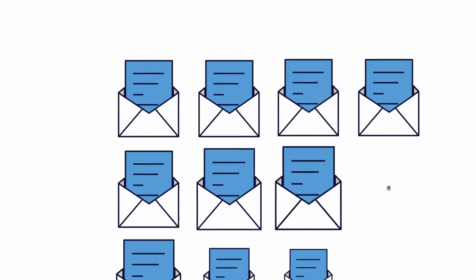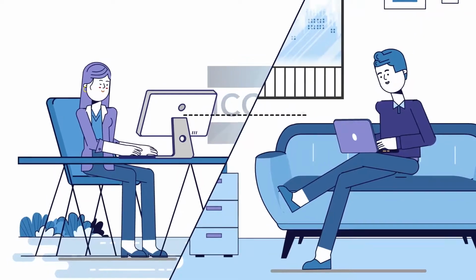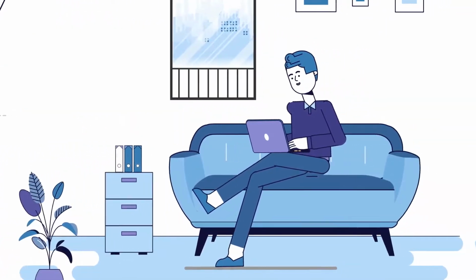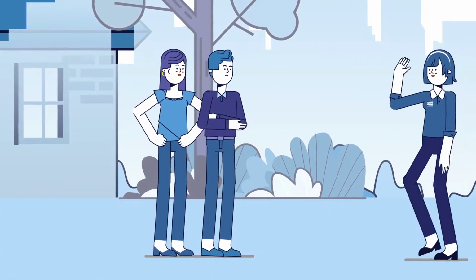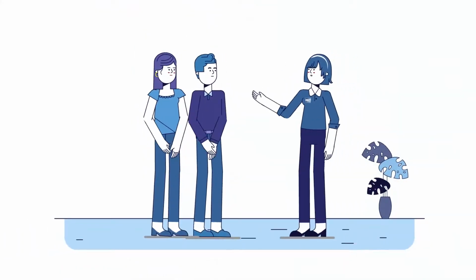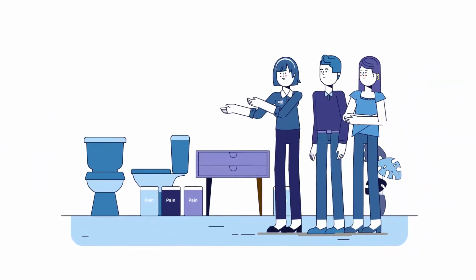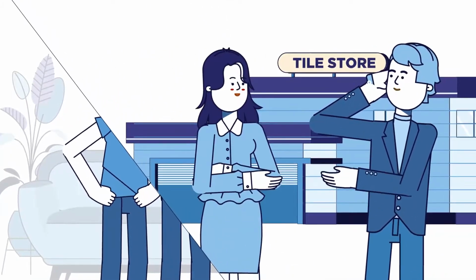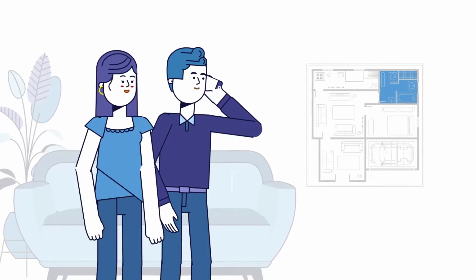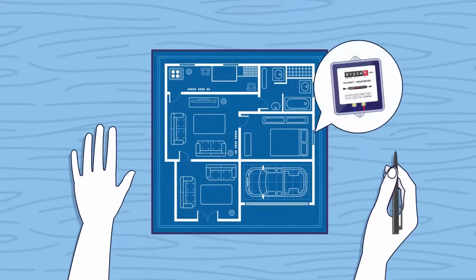Over the years, we have submitted hundreds of development applications, with approvals generally taking 10 to 12 weeks. During this time, you will receive frequent communication from your pre-construction administrator to ensure all is going smoothly with your application. The good news is, even while your DA is in council, there are still plenty of things to do to ensure we are on site as quickly as possible. In addition to you continuing to work with your colour consultant on your internal selections, we will schedule your appointments for you to meet with a tile consultant where you can choose the floor coverings and tiles to your wet areas, as well as meeting with our electrical consultants for lighting selections.